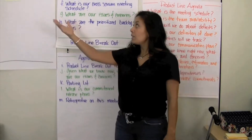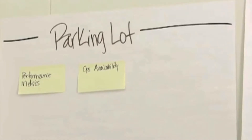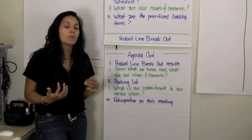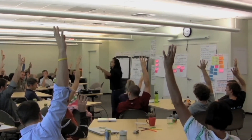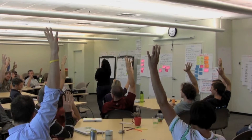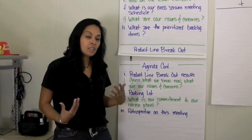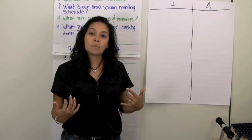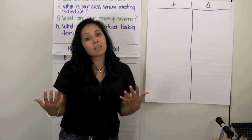Next we look at the parking lot, making sure we go through all parking lot items, revisit them, and deal with any issues before the meeting ends. Then I ask the team what their commitment is to their release plans — asking for a fist-to-five vote. The last item is a retrospective on the meeting itself, which is very important in shaping the release planning meeting for the next release. I get feedback on what worked well and what didn't, and this has really helped shape our agenda to what it is today.